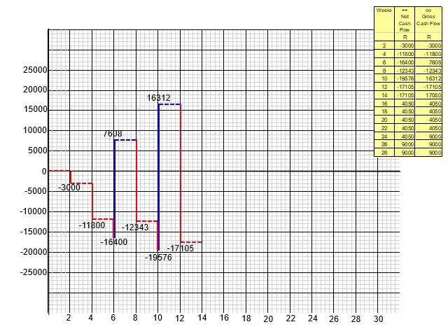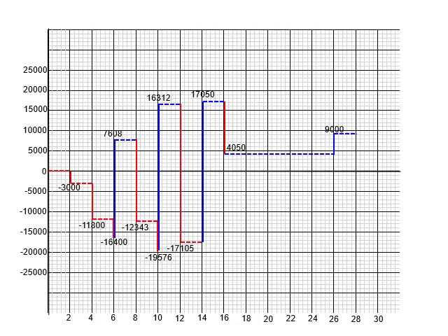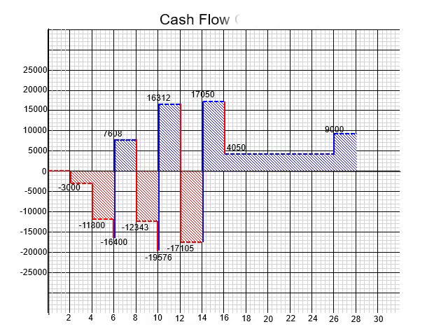Continue this process until week 28, always referring to the budget worksheet, relative to the week, and the gross and net cash amounts separately. As soon as we are finished drawing the lines, we use red to shade the areas demarcated by the dotted and solid lines on the negative side of the graph. Do the same on the positive side of the graph, using blue shading. Considering the completed cash flow graph, you will be able to observe the following. The final profit of the project, indicated as 9,000 Rand. The shaded areas in red indicating the periods and amounts of negative bank balances, also referred to as deficit cash.